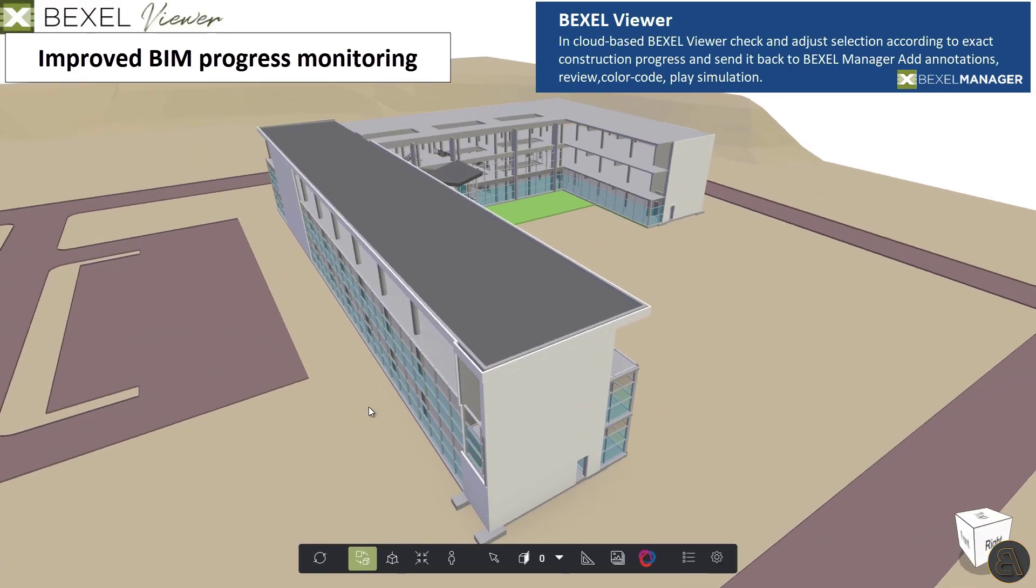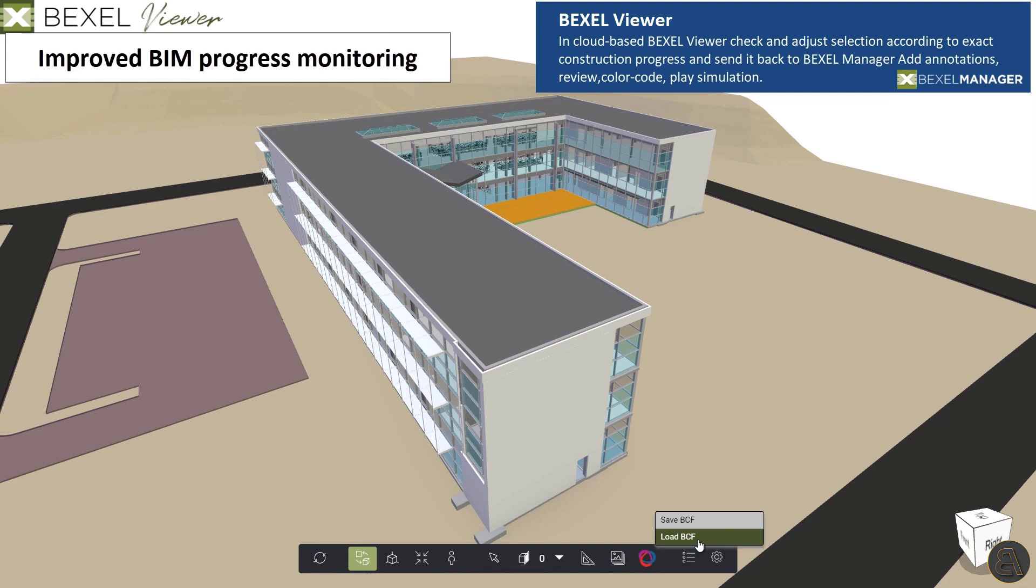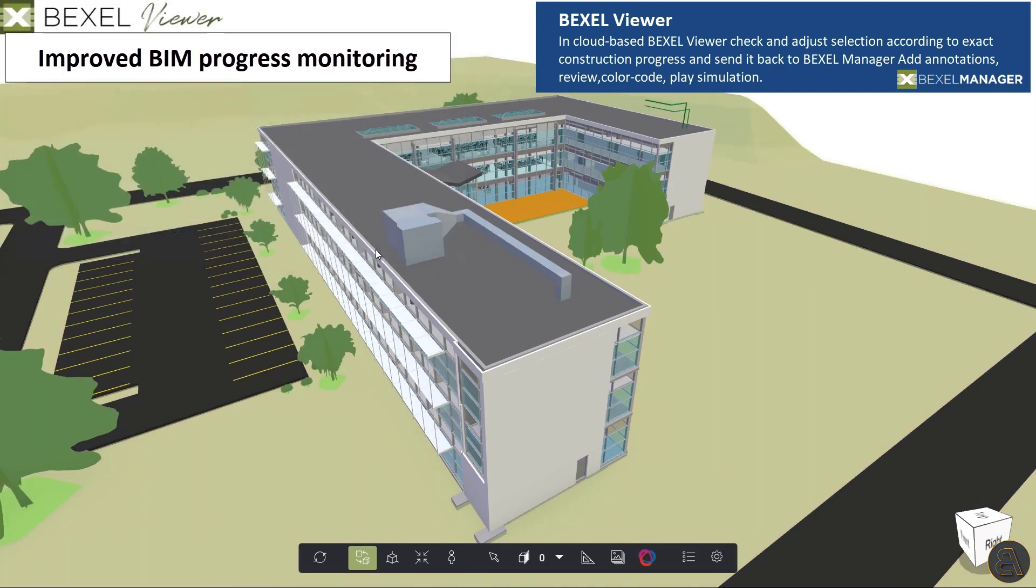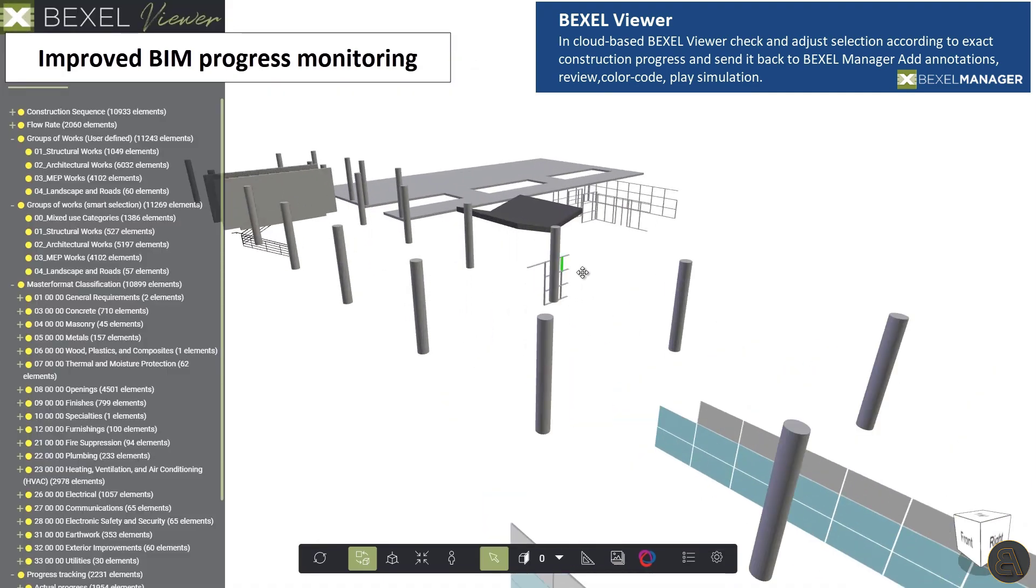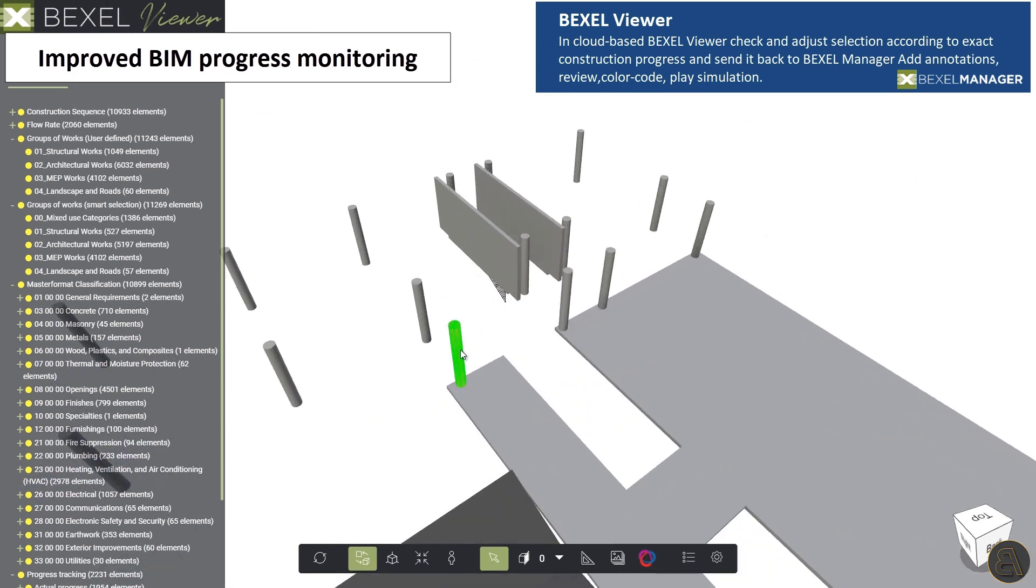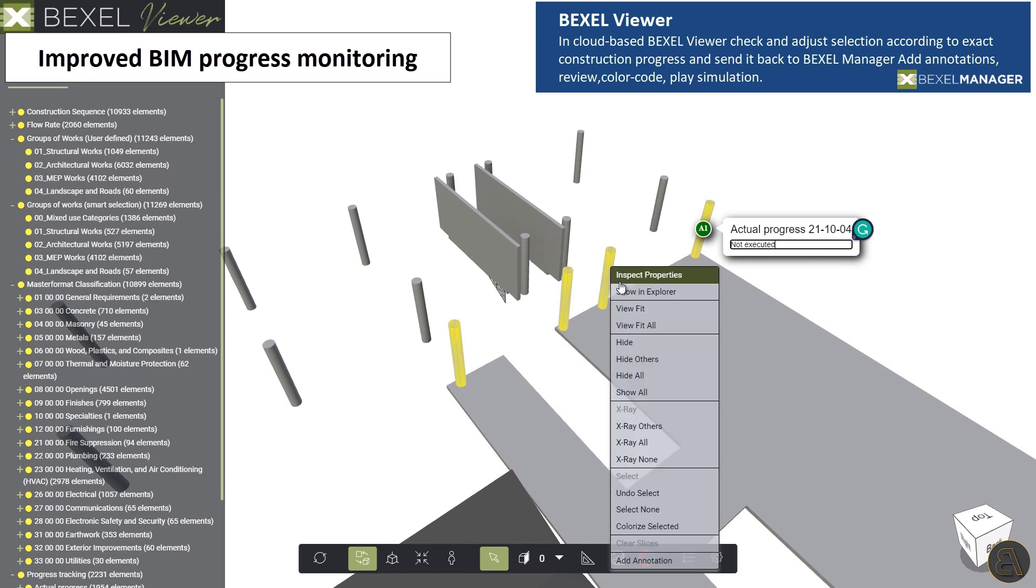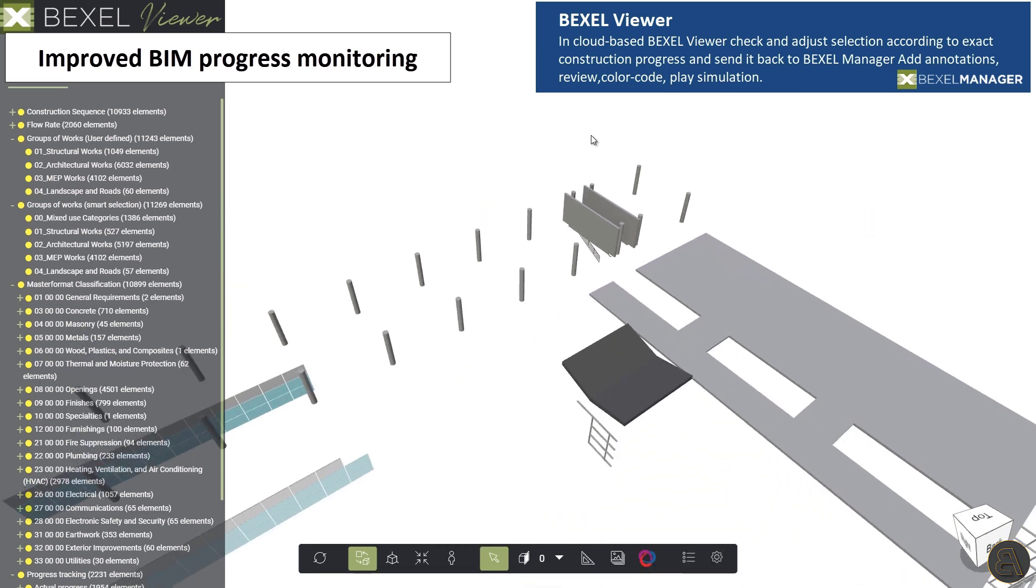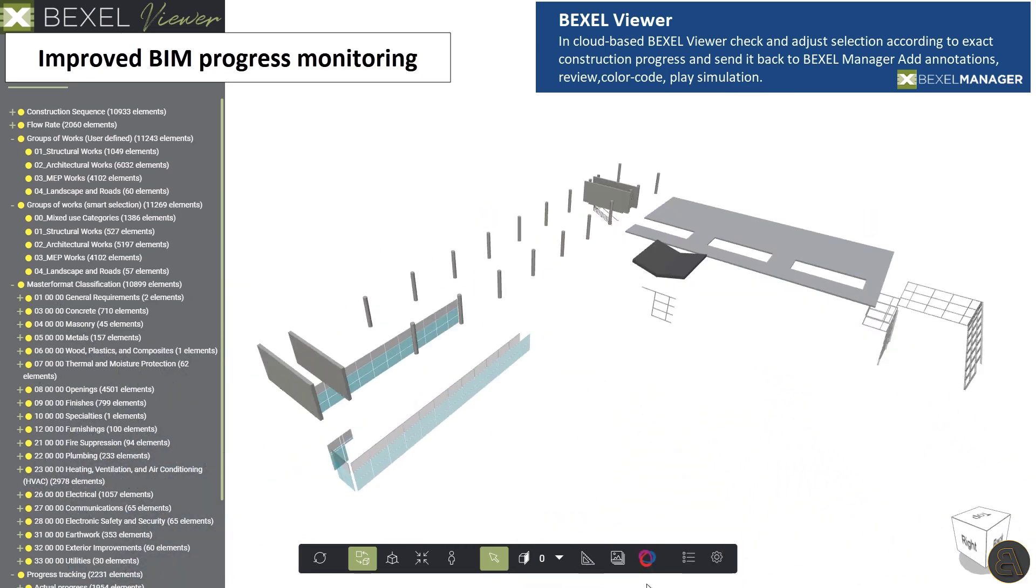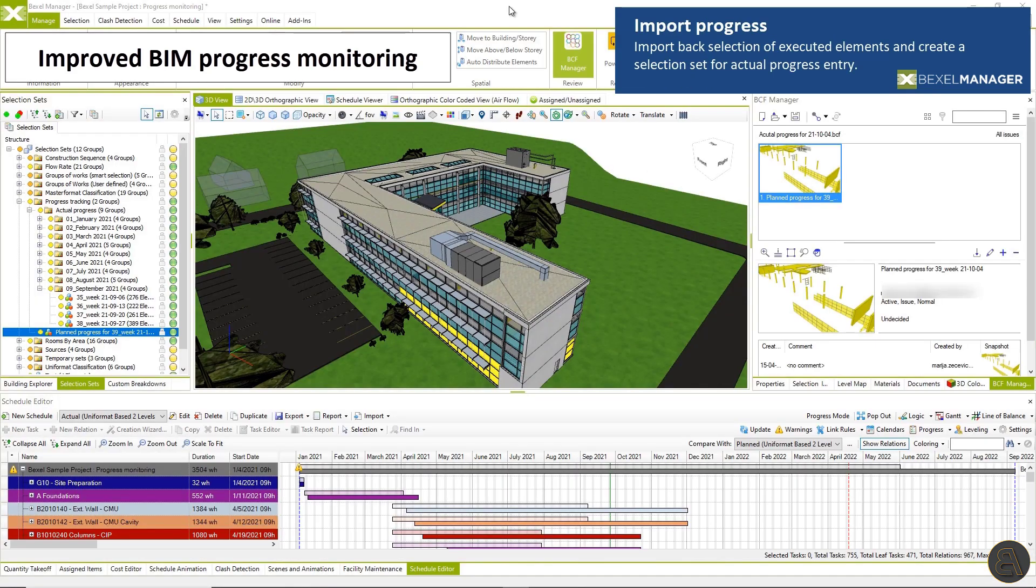In your browser using Bexel viewer, you can review the model, play 4D simulations, add annotations and so much more to adjust planned progress according to the actual on site situation. Open the BCF file, check and change the selection and send back to the actual progress to Bexel manager via BCF.